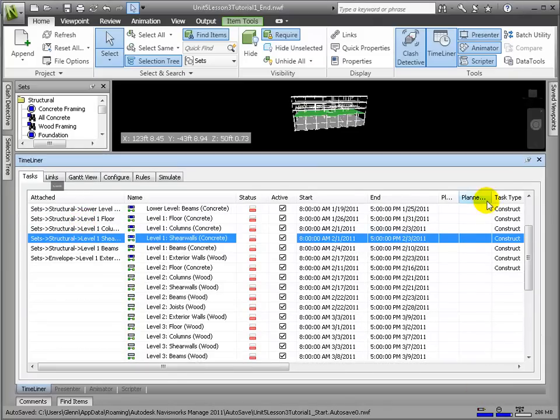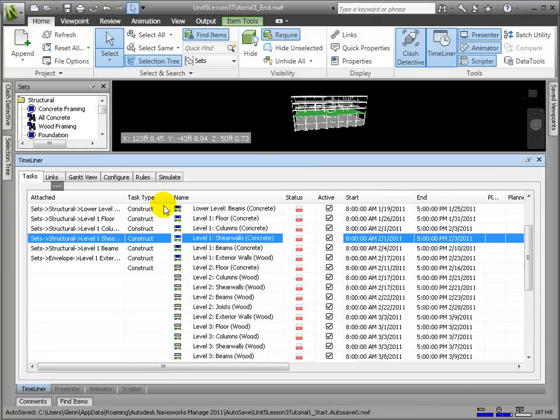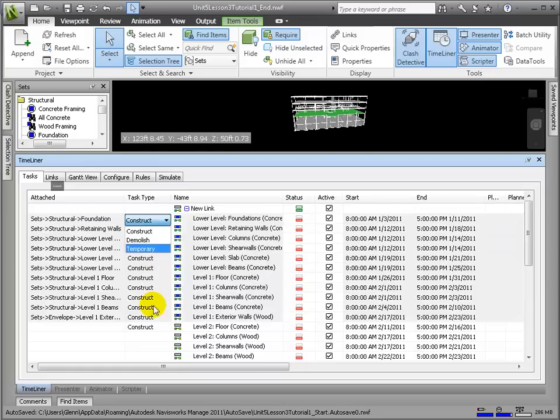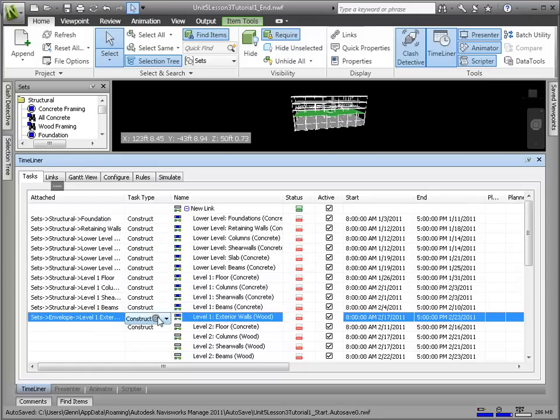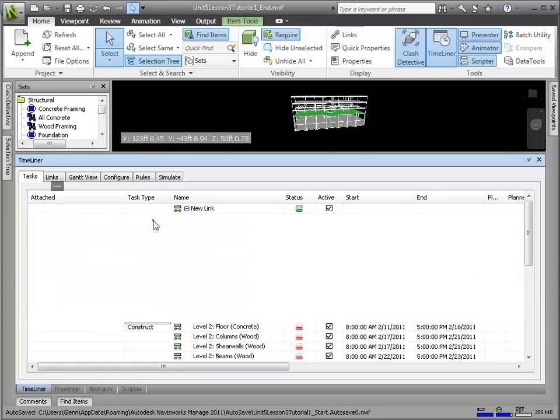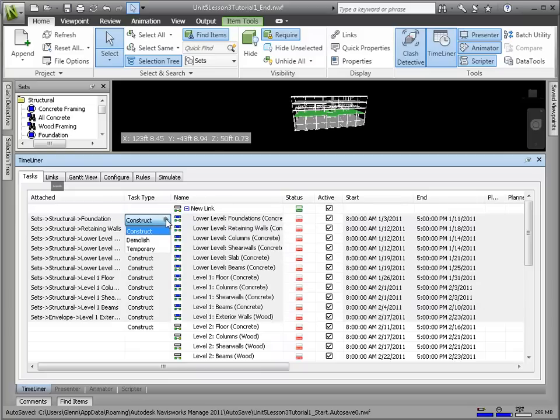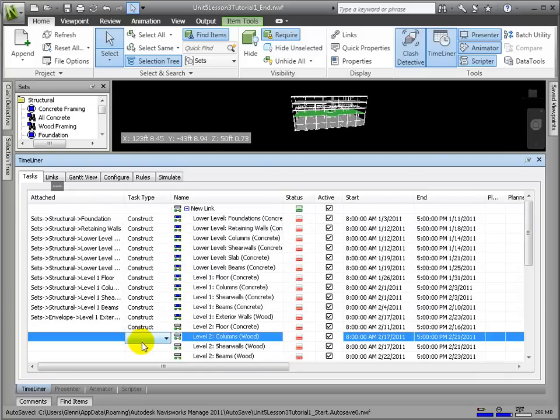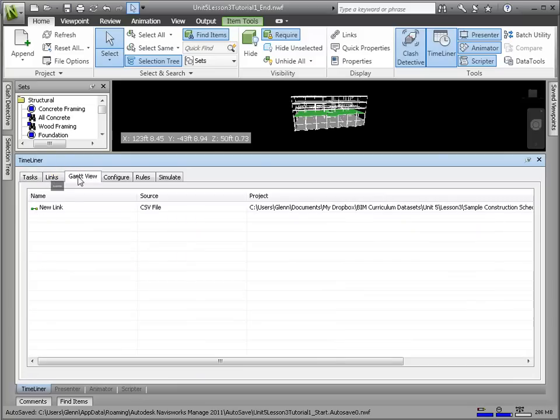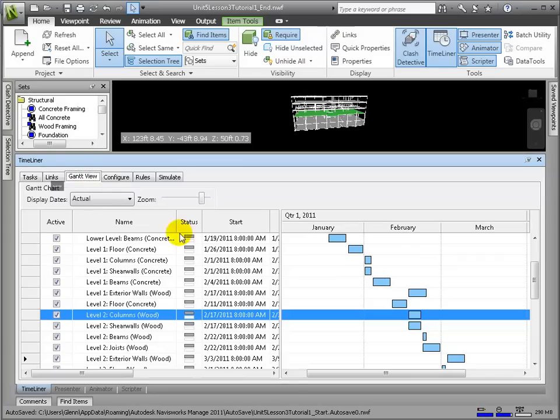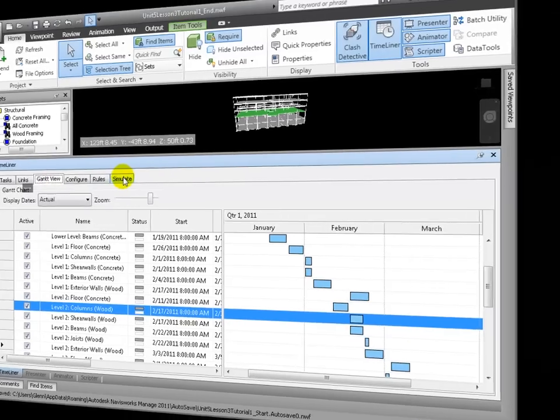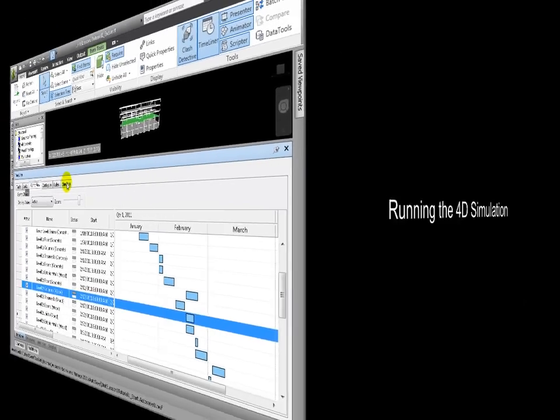For each task, we need to define a phase type. There are three predefined activity types: construction, demolition, and temporary. Users can define new ones as well. These will control the method of displaying the 3D elements, both colors and transparency. Now with our model and schedule linked, we can run a 4D simulation.